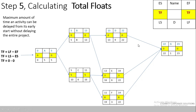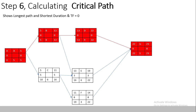In Step 6, the last step, we identify the critical path, shown in red. The critical path is the longest path with the shortest possible duration, and the total float on the critical path is always zero. Applying this: Activity A has 0 total float, Activity B has 0, Activity D has 0, and Activity G has 0 — forming the critical path A → B → D → G. This path finishes on day 23, which is the total project duration. These six steps allow you to calculate the critical path of any network diagram in a simple, step-by-step way.